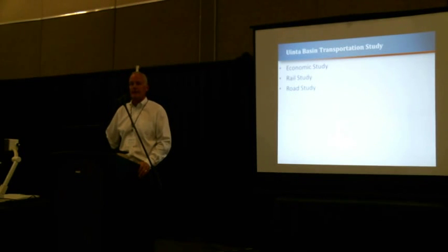And so we identified 26 possible alternatives. These routes range from 100 miles to 250 miles long. And then we tried to say, well, are any of those feasible to be built? And UDOT has invested a lot of money in some technology and some tools that allowed us to very quickly evaluate those 4,500 miles of alternatives and say, yeah, it looks like we got about 2 alternatives that look pretty good. One of them went up Indian Canyon along 191, shared the roadway, and then punched through Indian Canyon Pass with a 10-mile tunnel and ended up in the Emma Flats area.